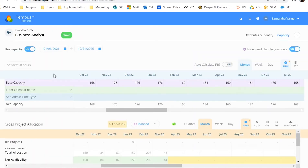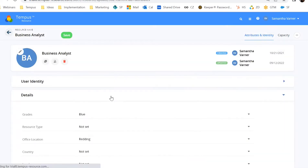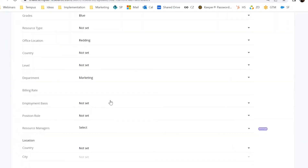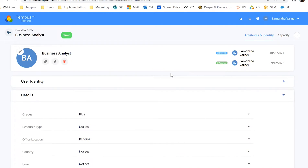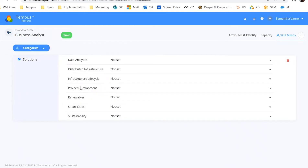In this example, we have a Business Analyst as a demand planning resource, configured by the flag 'is demand planning resource.' Unlike Dave, the base capacity is now purple. Even though hours exist, Tempest will say this business analyst is a demand planning resource, meaning anytime we look at capacity, this resource effectively has none. If you're using generic role-based resources, I recommend having demand planning turned on and keeping the capacity hours in there. Attributes and skills can also be applied to these demand planning resources.